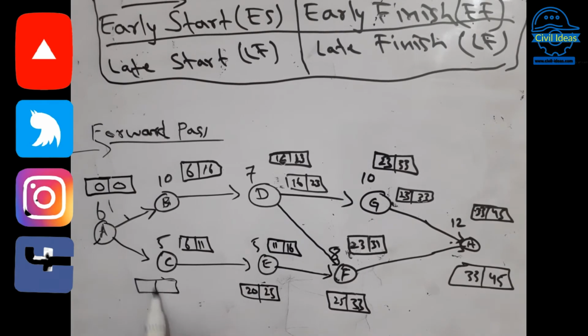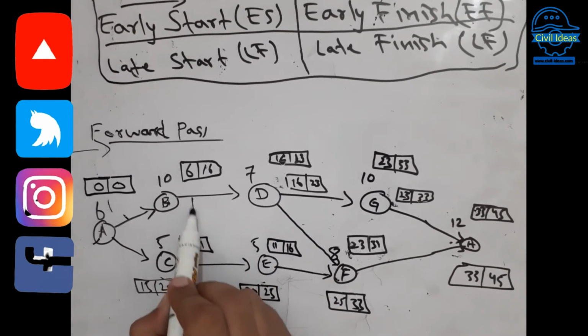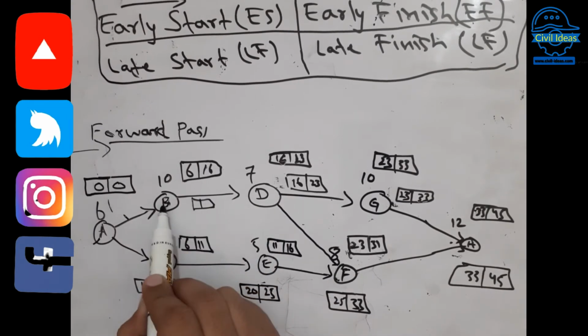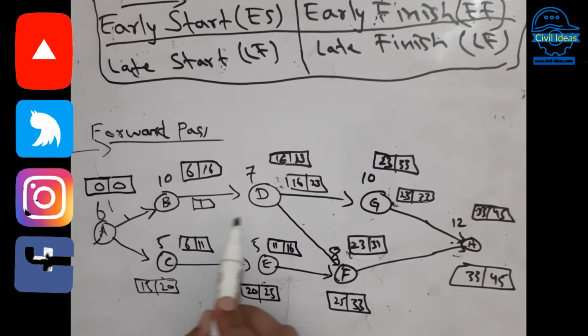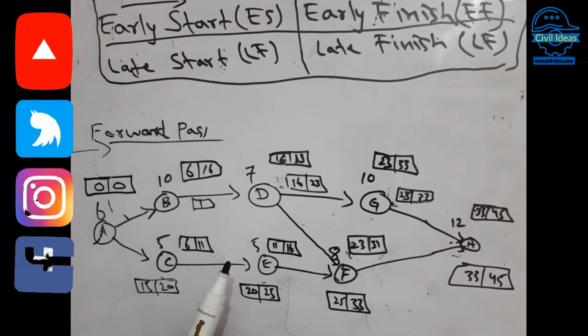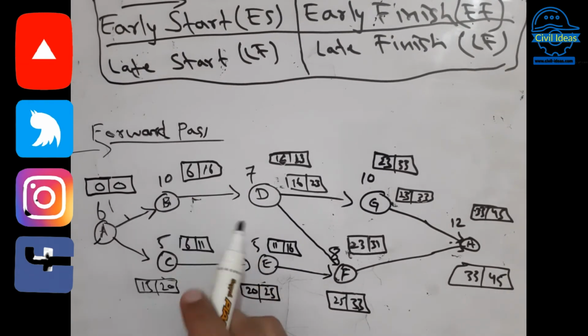Here there is the activity late start time. There is only one successor for activity C, so you have to take the 20 late start time, and 20 minus 5 is 15 days. Okay, and now here you have to take this for activity B and this for activity C. You will not be confused, because I have made the diagram very congested.